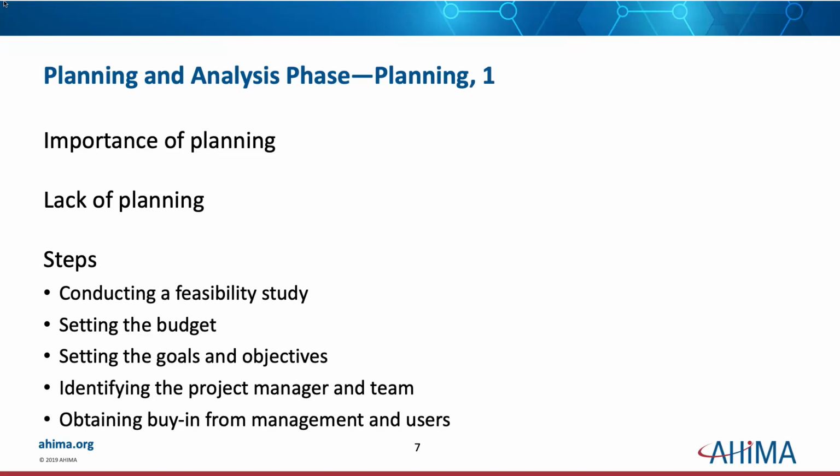You may decide that some of the work has to be done in-house by your IT people, such as testing, rather than having the IT company do it. The IT company may be very used to it and they may have the people to do it, but if that costs you more money than what's in your budget and you still want to be able to have the functionality that you have, you may find that you're going to have to find people within your own organization to do some of the hourly work, so to speak, of making sure everything is where it needs to be.